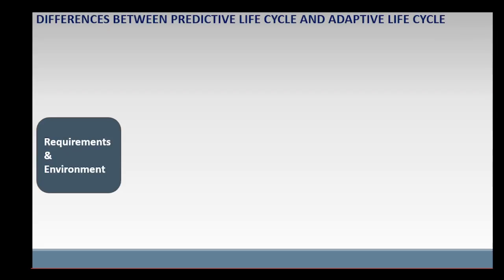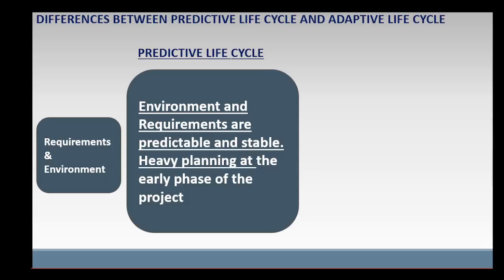These differences are in terms of requirements and environment. Predictive life cycle is used in situations where the environment and the requirements are predictable and stable. Heavy upfront planning is done at the early phase of the project. For example, all the requirements of a house, including architectural and structural design, are predictable and are planned in advance.